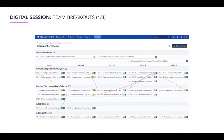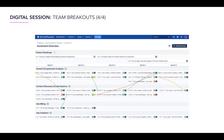Each team's draft plan is visible to the entire Agile Release Train in the increment overview — a digital version of the program board. This facilitates cross-team planning and dependency management, allowing distributed team members to participate in PI planning. Digitizing this limits double-handling of information: in a physical session, someone has to pull post-it notes off the wall and enter them into JIRA at the end. The digital approach also means we can track progress toward feature completion in real time.